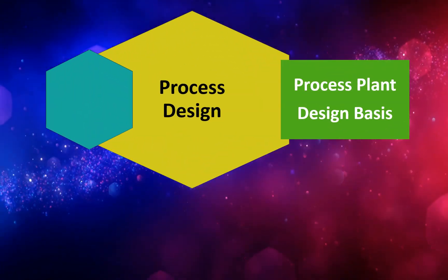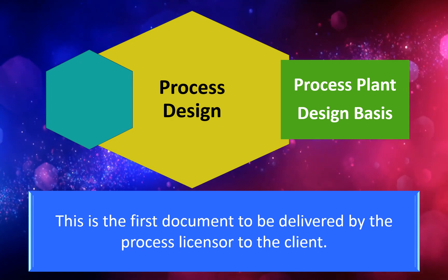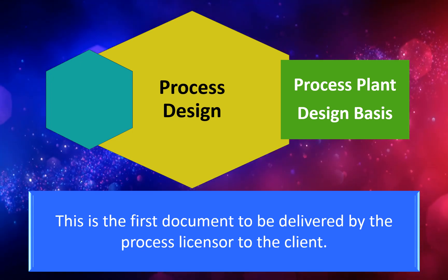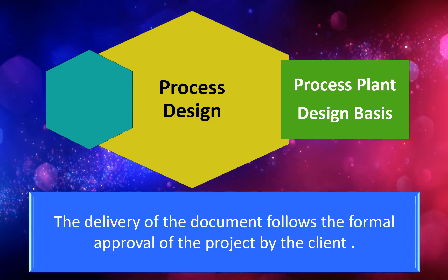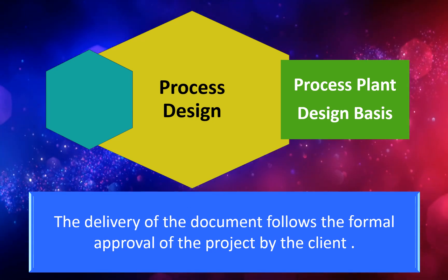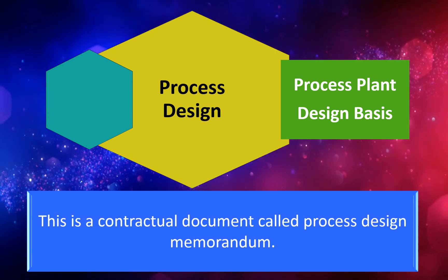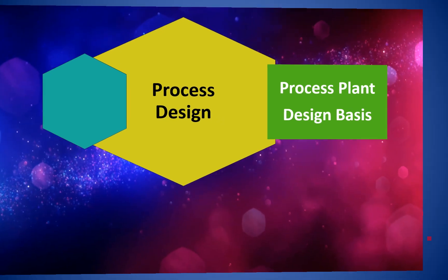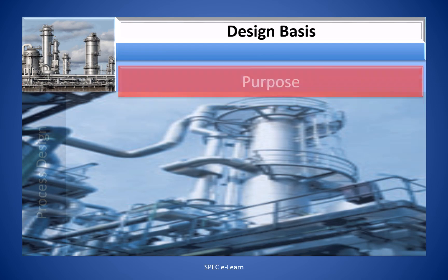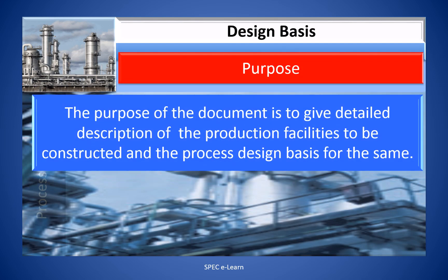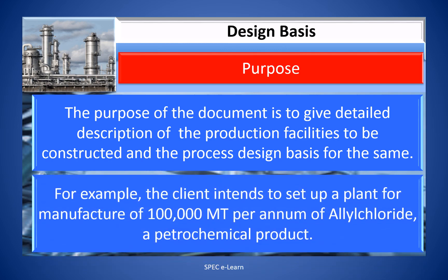The process plant design basis is the first document to be delivered by the process licensor to the client. The delivery of the document follows the formal approval of the project by the client. This is a contractual document called the process design memorandum. For example, the client industry sets up a plant for manufacture of 100,000 MT per annum of allyl chloride, a petrochemical product.